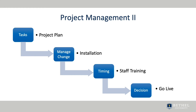Each of these phases has many options and needs to be discussed before and during the project planning and installation. For example, some organizations may choose to roll out the installation to only a few units at a time. The go-live is the time when the new system is up and running. Converting data from the old system to the new system needs to be planned out before this event, as well as planning for downtime procedures and problems that may occur during the go-live.